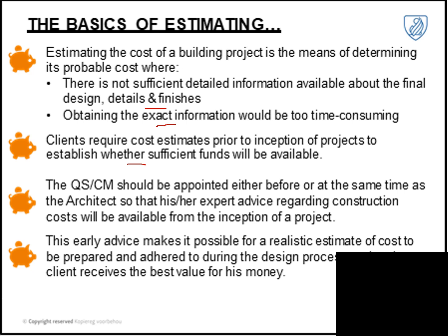But if you are involved early on, you can state that for this type of development, this will be the maximum size of the project. This type of site layout will have a higher rate per square meter, for instance, for the construction, and hence you can put certain parameters on the design that it cannot exceed this size or so, then allowing for the external works that is usually excluded in these early design discussions.